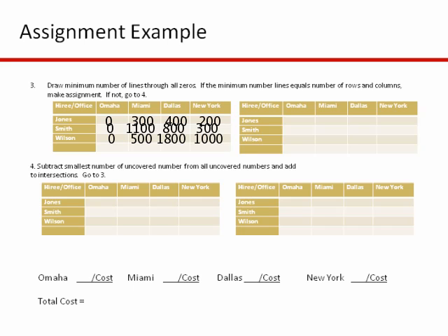It's a dummy. Okay, so the next step is you want to draw the minimum number of lines through all the zeros. All right, and the key word there is minimum. So if I look at what is the fewest number of lines I can use to cover all zeros, it would be 2 lines. All right, and these have to be either vertical or horizontal lines. You can't do diagonal ones, okay? So the minimum number of lines to cover all zeros will be 2.